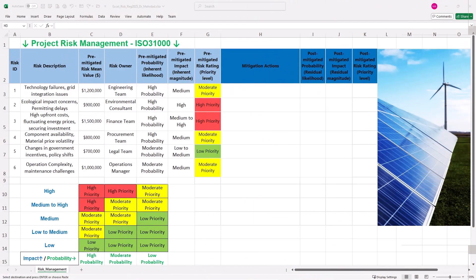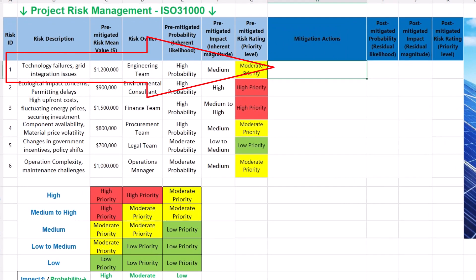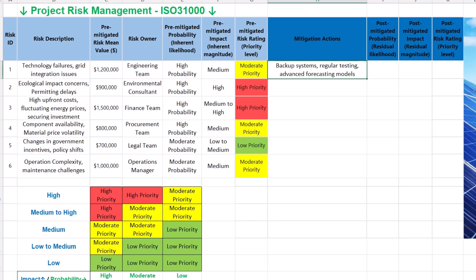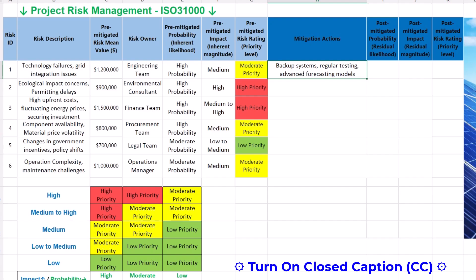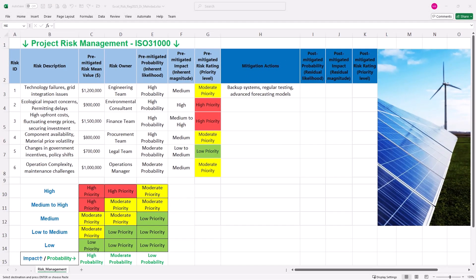Step 3 is risk rating in Excel using INDEX and MATCH functions. For our risk register to be complete, we need to record mitigation actions against each risk. For technical risks, mitigation actions include using backup systems, regular testing and advanced forecasting models. These align with industry best practices for managing technology failures and grid integration issues, as highlighted by the National Renewable Energy Laboratory's guidelines. McKinsey also emphasizes the importance of advanced forecasting and planning to address challenges associated with renewable energy integration into power grids.